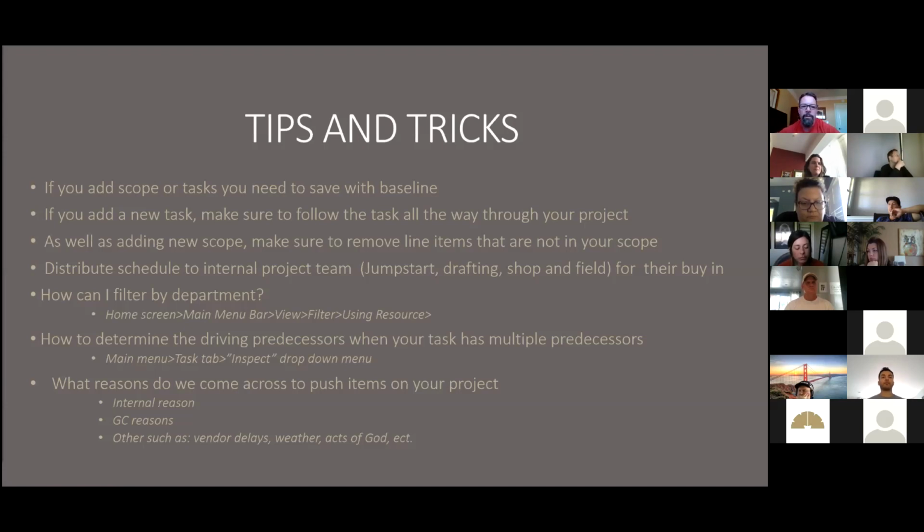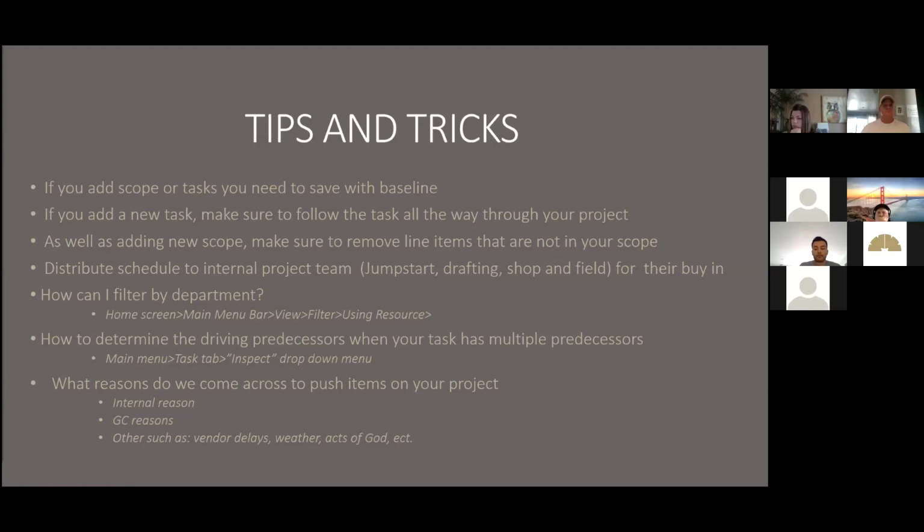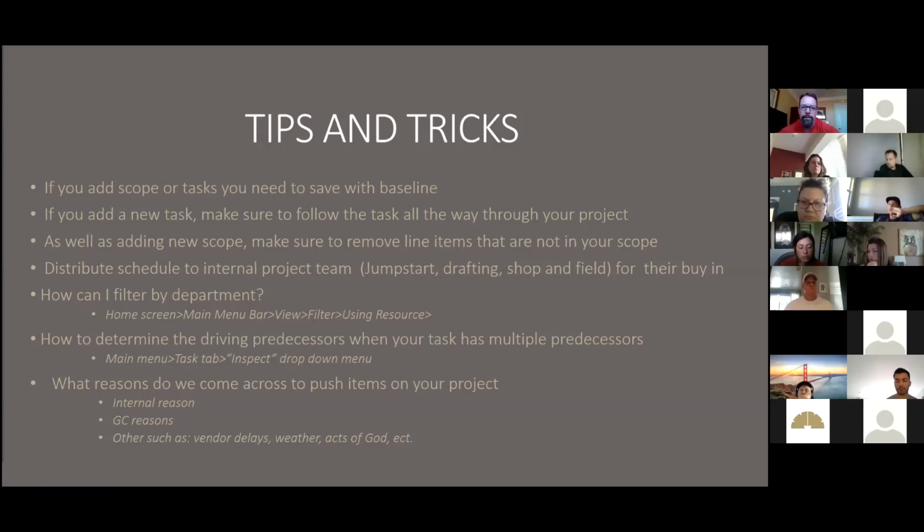Distribute the schedule internally to the project team, Jumpstart, drafting, shop, and field for their buy-in. Always do that before you send this to the customer. This will happen as soon as you do your first draft of your schedule and you think you have it complete. You want to take that schedule and send it out to the rest of the team to get some feedback.